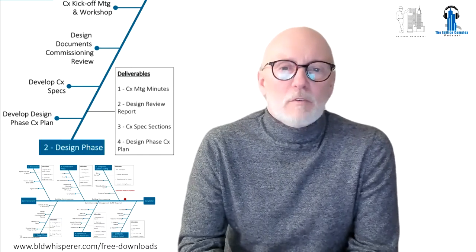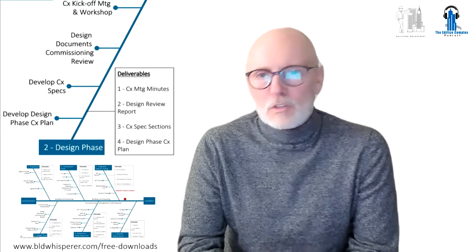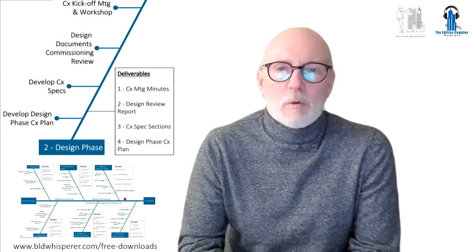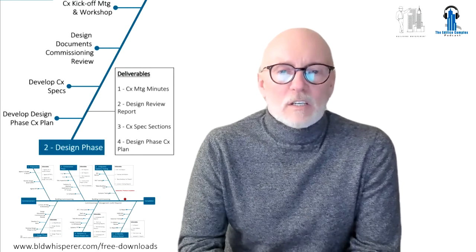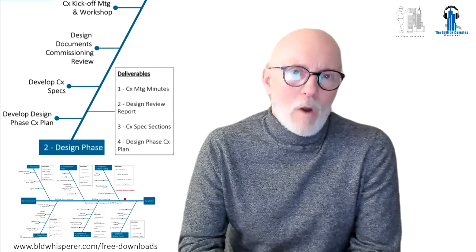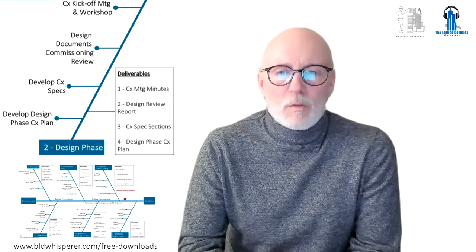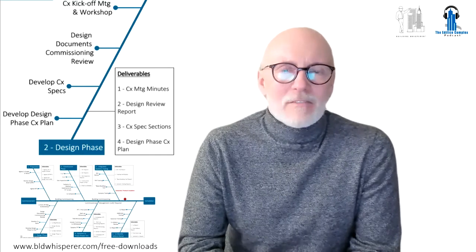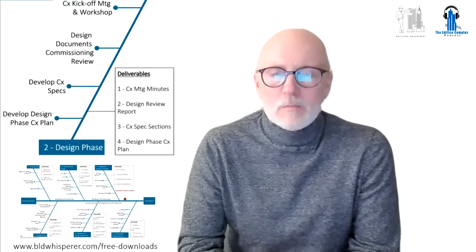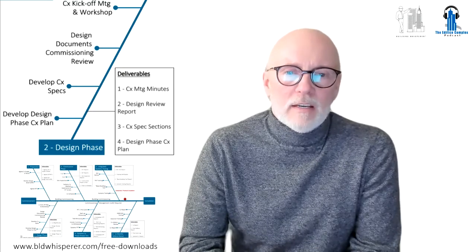The commissionability design review and report. So let's get one thing straight. This is not a first principles design review. We are not the design team. We're not paid enough to be the design team. We're barely paid enough to do what we're supposed to do. So this is about reviewing the design drawings and specs where they are for commissionability issues. The fundamental question we're asking ourselves here is: is everything there within this design to successfully set the system to work and put it into operation properly and verify its operation properly? So that's what we're looking for.